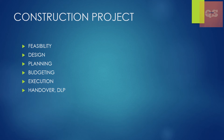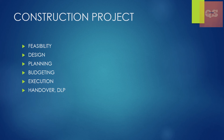They can identify different equipment or materials for piping, MEP activities, or civil activities where quality is not compromised but the purpose is served efficiently and effectively. During the execution stage, site engineers and project engineers carry out value engineering mainly by increasing the productivity of labor — finding better ways to utilize workers so the project can be completed faster and more economically. Finally, during the handover and DLP period, the focus is on maximizing profitability — using fewer people to carry out defect rectification works and monitoring the process efficiently.